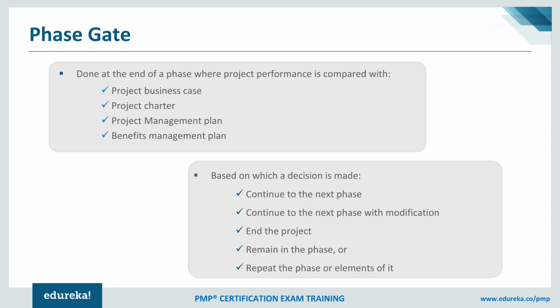You will come across documents like the business case or project charter, the project management plan or benefits management plan. And we created certain things there. We may have put up milestones of the project, or we may have put up how the benefits would be realized on this project once we deploy it in production, once my customers start using it. So I need to then compare the performance of the project with what is mentioned in these documents. That's what I do typically as a part of the phase gate, and these things help me in taking certain decisions.